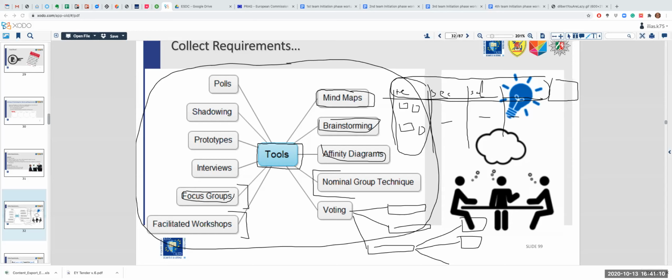And whenever he sees the guy going, oh, what is this? He would note it down: okay, there's a bug here, I need to fix it. Or he would interact: what is it that triggered this reaction for you? You know something, there's a feature missing here, and if that is not in place, I will not be able to do what I'm supposed to do with this system. So this is how shadowing works. You have an expert monitoring somebody interacting with a prototype.